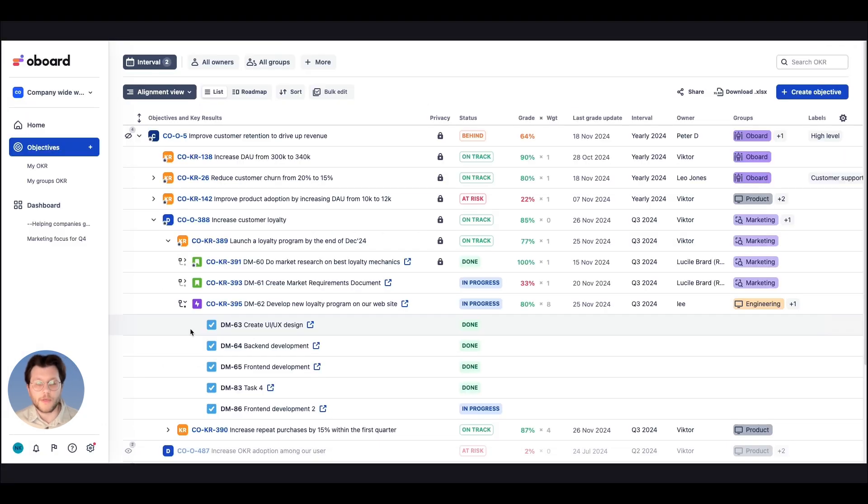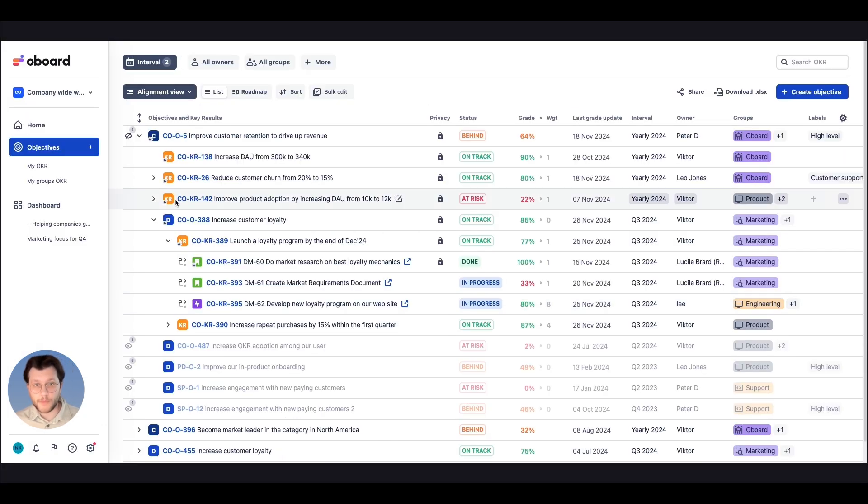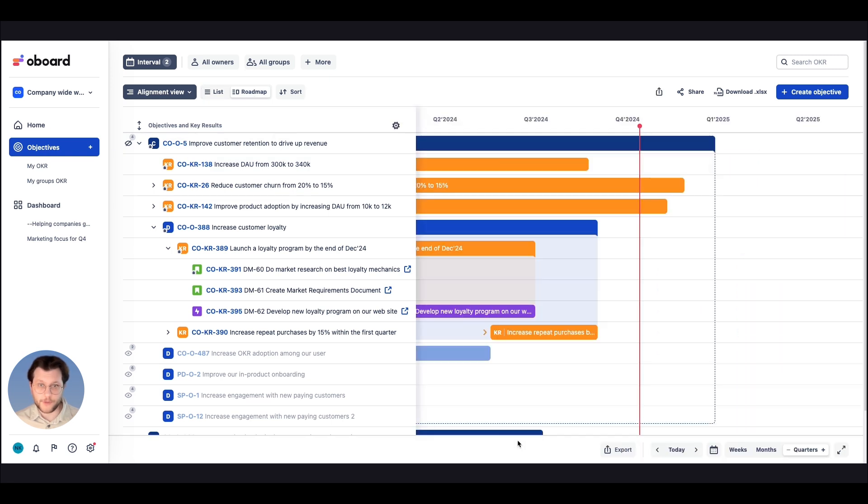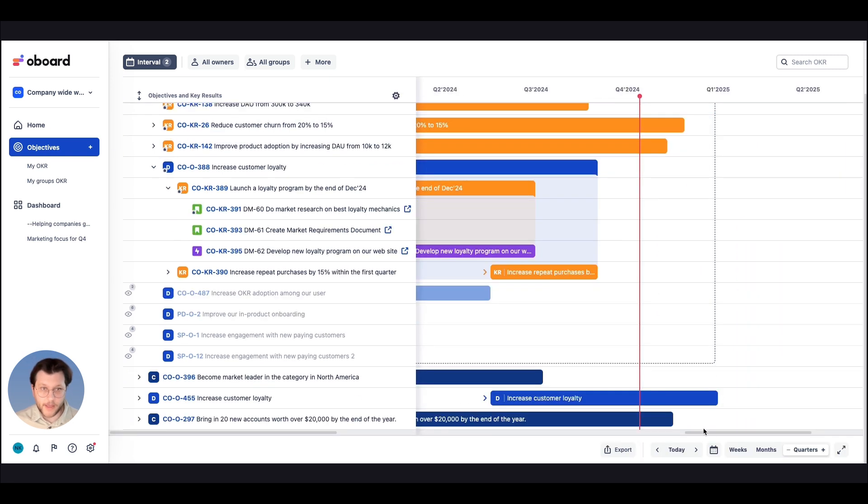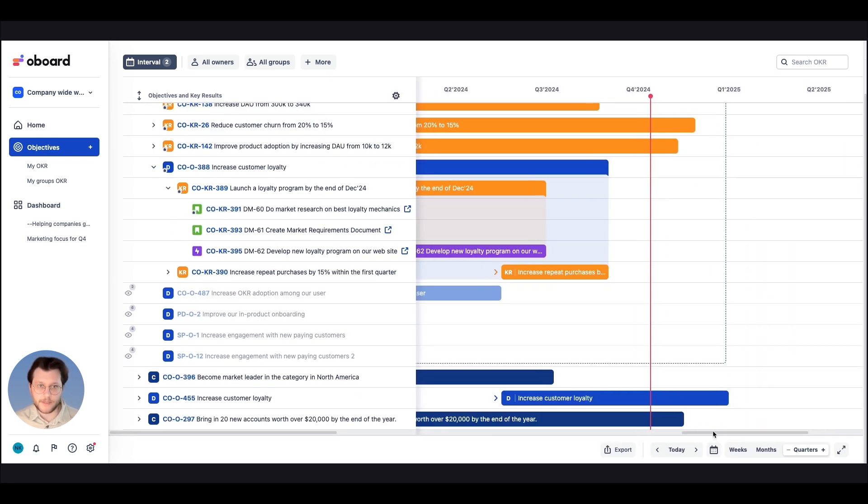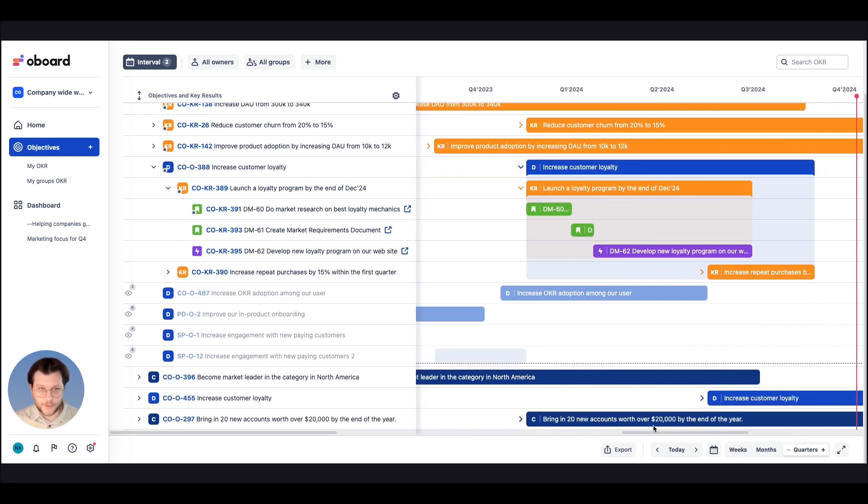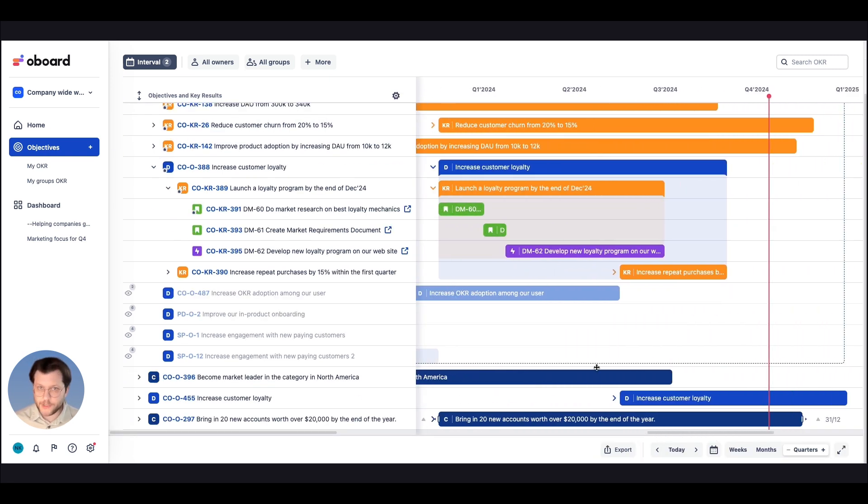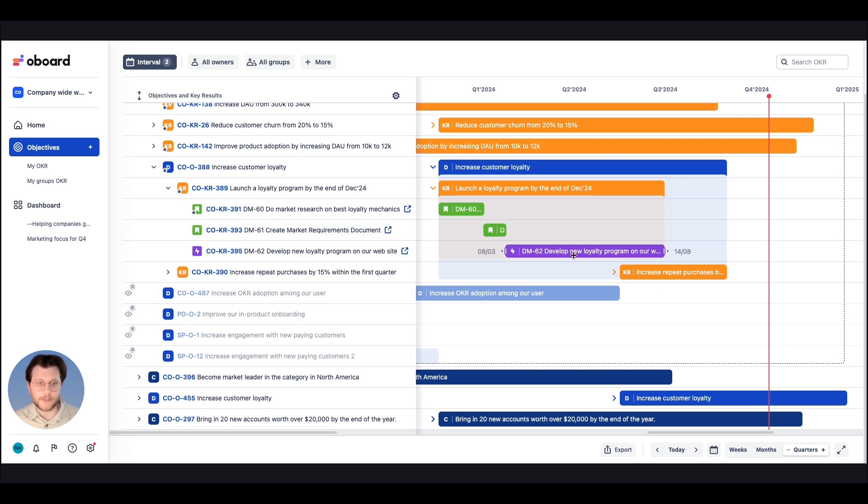To give you even more clarity, our roadmap view will highlight your timeline and team dependencies, featuring that engineering team can only start working right after the marketing completes their piece.